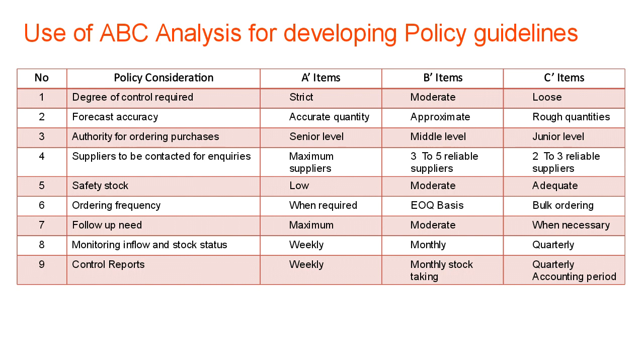And then safety stock, because in some items we need to have a very high one. For category A, we cannot afford to have more safety stock. Okay, like we must be ready to go for the purchase as and when required. Whereas for B items, we can have a moderate one, and C items, it's not expensive, so we can get those small items and store them, because even procuring them will be more expensive than having them in inventory.